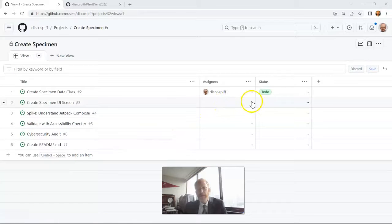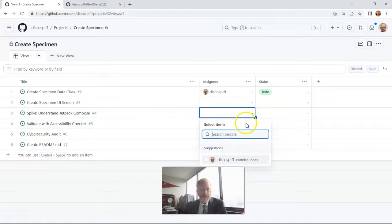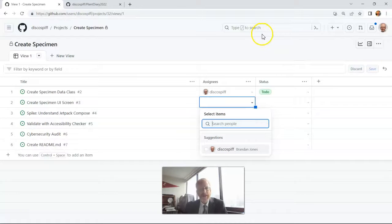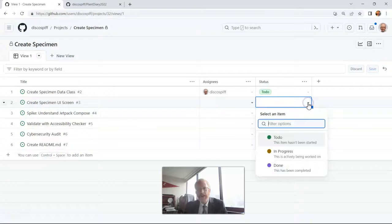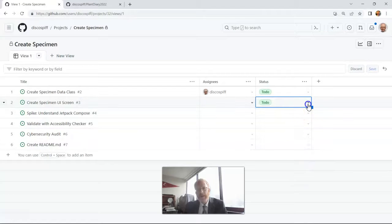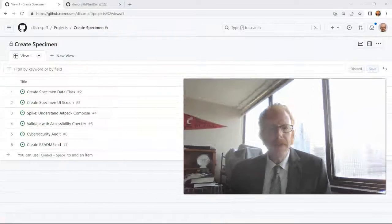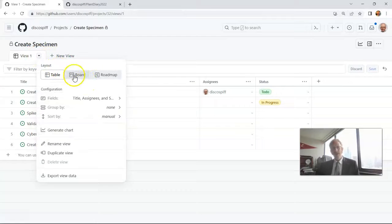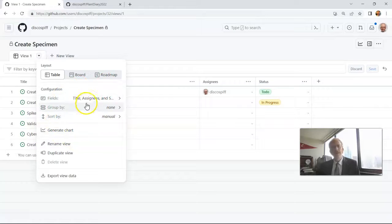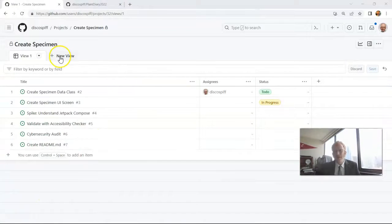After adding all individual tasks, you'll notice in this table view it's really easy to edit multiple columns at once. This project only has me working on it, but normally we could just click here and assign assignees right in the table. We could also change the status — for example, mark 'create UI screen' from To-Do to In Progress — and we could add other columns as well. There's a dropdown giving us options for layout: table, which we're on now, board, which we'll see in a moment, and roadmap. We also have configuration options like fields, group by, and sort by. That ability to have different views of the same data is a really neat feature of GitHub Projects, because you're looking at the same data each time, just presented differently for potentially a different audience, and you can have multiple views simultaneously.